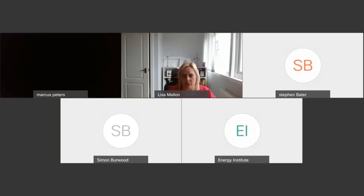And Marcus, let me start with you, I think. I'm going to try and not get on my soapbox at this point. The problem is with most organisations, and I include my own in this because we're having active discussions as part of our integration planning. People talk about lessons learned, and what they actually mean is lessons captured. And you're then wholly reliant upon the corporate mind of the people being still enrolled to say, oh, I remember in 2014 when we had this incident, because there isn't really a learning depository that you can search and pull that information down. I think that is true of most organisations.